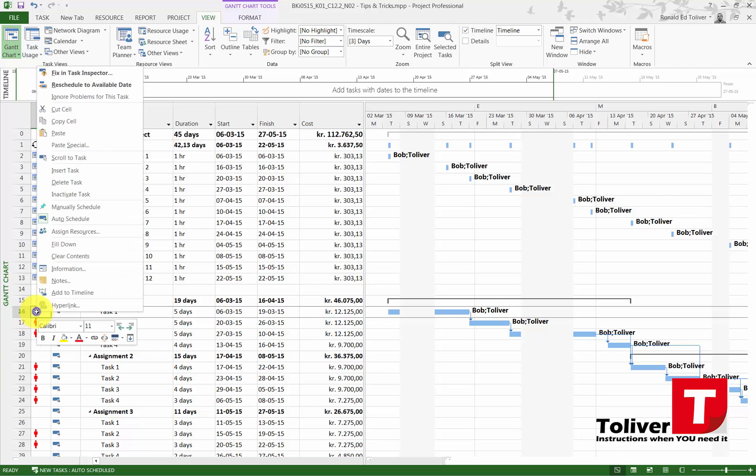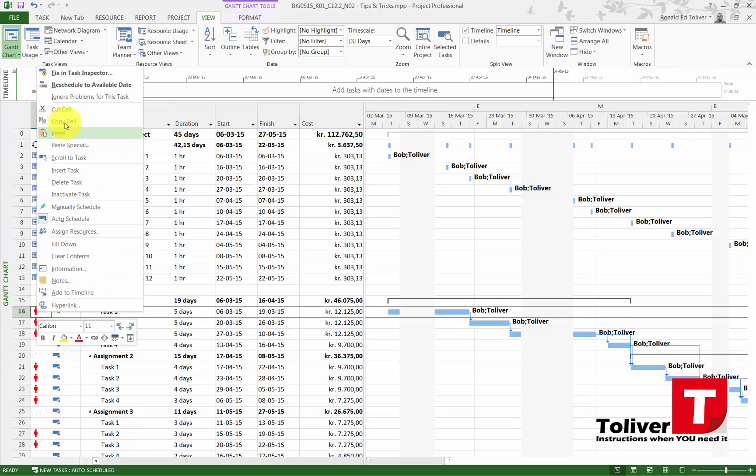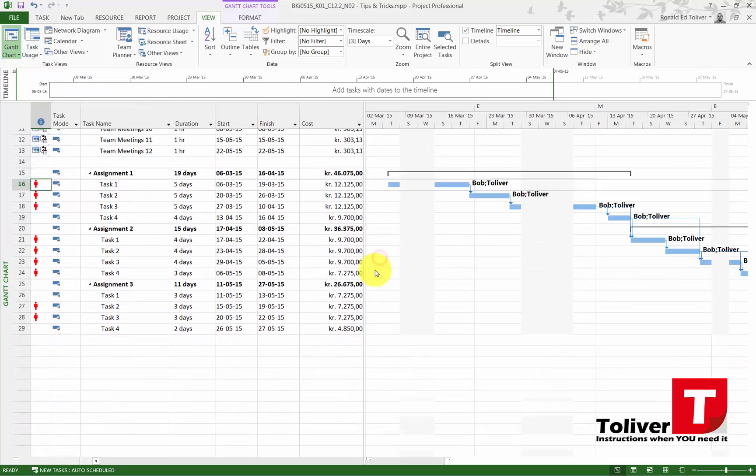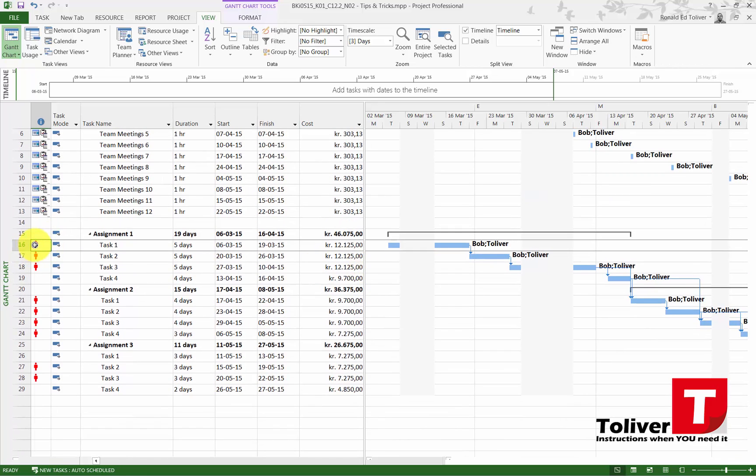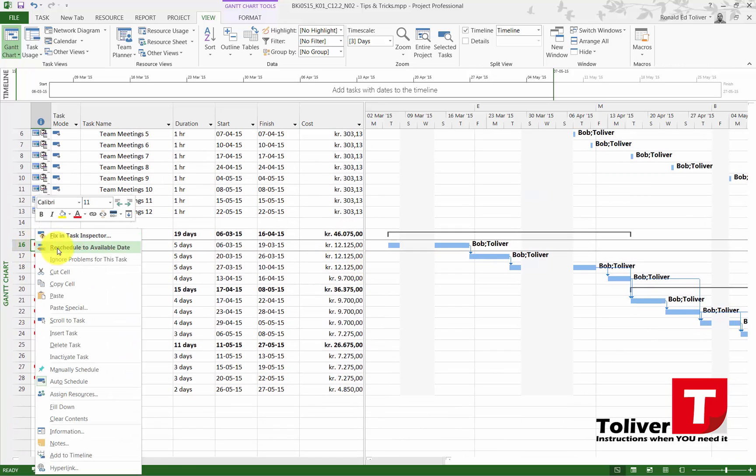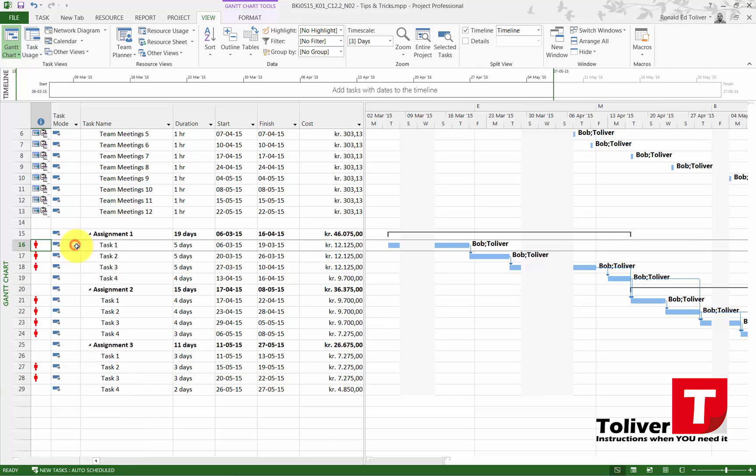You can right-click on it and say fix in the task inspector, or you can say reschedule to available date. Just for fun I'm going to try reschedule to available date. Notice I'm finished the 27th of May, but the minute I did that I actually almost added two months to my schedule, or actually almost three.